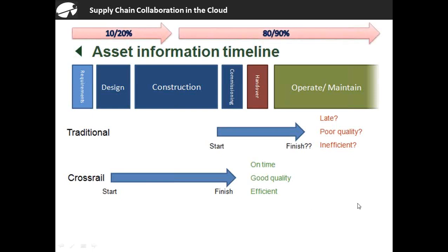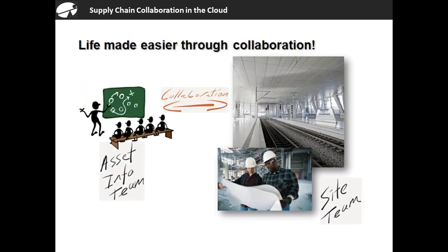So yeah, one thing I wanted to mention was asset information during the design phase is only 10 to 20% of the data that is ever associated with an asset. So most of the information is actually used in the operations and maintenance phase. So essentially, the handover is extremely, extremely important.